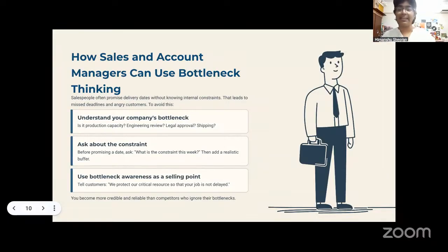Then we move on to sales and accounts manager. Over here, the client is signing the final SOW, the scope of work. They're taking a lot of time signing because the legal work is a lot of back and forth. So you're having a lot of issues with that. What can happen here? You name the issue: we are having so much issue with signing. Then you exploit it. You say, we'll give you all the documents, all the templates, make the work as easy flowing as possible for you. Just get the paperwork done in less time. You will set the target: we want this to be done in less than 4 hours. For that, you track it, you measure it, and you evaluate it. Once you're done evaluating, if the result is good, good. If it's not good, you report to your supervisor.